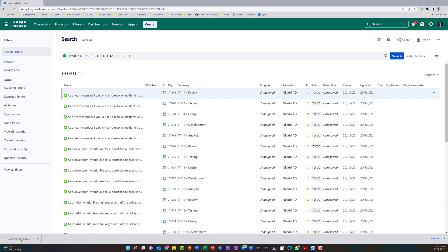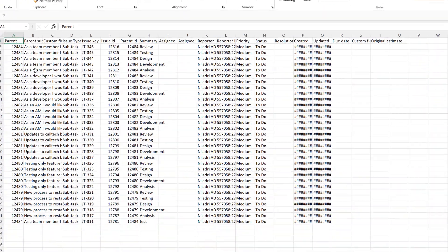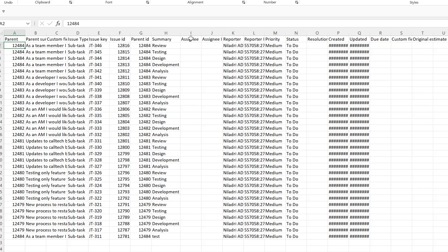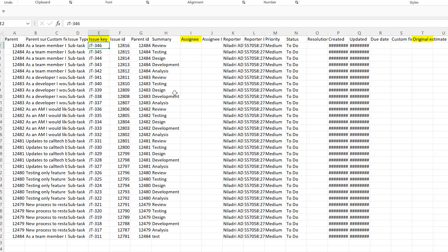The file is exported. I'll open it to see how it came out. This is what got exported — I have the parent and a few fields. I need to identify what I'll be updating back in Jira: the assignee, the original estimate, and the issue key. The parent ID I don't need because it will directly update via the issue key. The rest you can keep for reference.